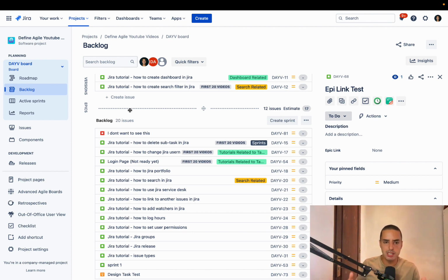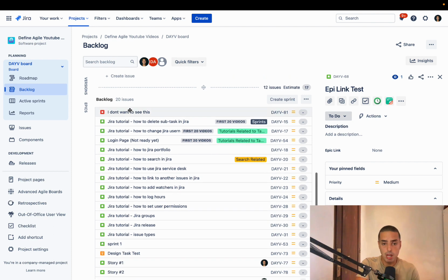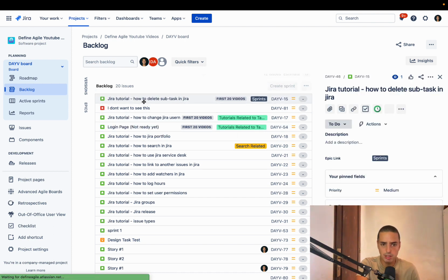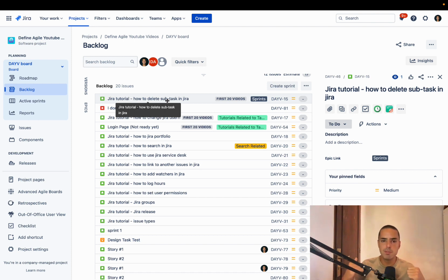And ideally, you will have your sprint, and somewhere in the middle of the sprint, you'll have a backlog grooming session where you would prepare everything for the sprint planning, or if you work in Kanban, to give it to the developers and put it on a Kanban board. So what's important about the backlog? It's important to prioritize. You don't have to groom everything. You have to groom the most important things. You have to ask questions. What is the most important for us to work on now? This comes from vision. This comes from stakeholders. Once you realize that, you move it to the top of the backlog, because we always take things from the top of the backlog, not from the bottom. So everything at the top of the backlog needs to be well groomed. And then as it goes down the backlog, it can get less and less groomed.